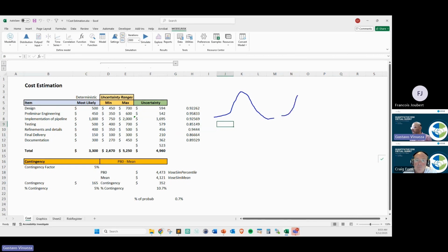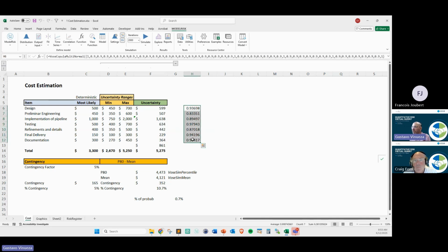So if you have a distribution A and B, and you're doing correlations, that means that A is fetching the correlation from here, and B is from here. If I do it again, you see that normally they are built in tandems like this. You see every one in more or less the middle of the distribution, very low, low, middle. You see why? Because we have very high correlation coefficients. Should the correlation coefficient be very low, this is going to be all over the place.